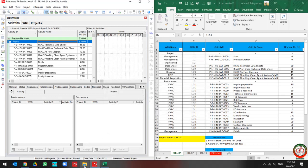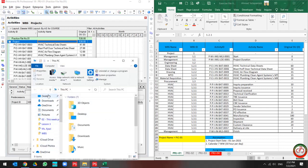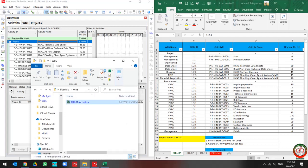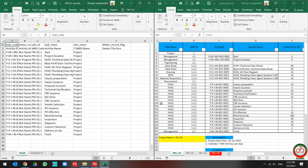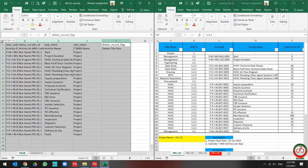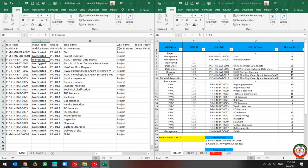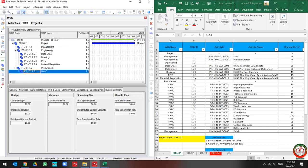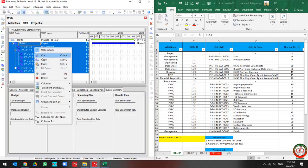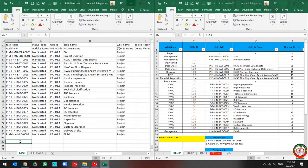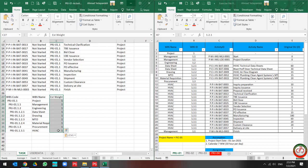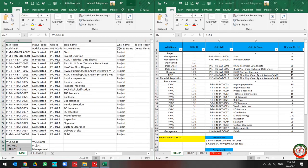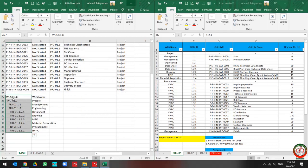Our file is exported and I need to open the file and split the screen. This is my exported file and this is my project WBS file. I'm going to change this WBS code to match this one. But first, I need to go to the WBS section and copy and paste all the values from Primavera P6 over here. I need to replace the WBS code for this activity, so it should be the pure WBS code.